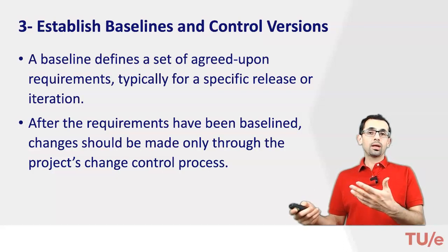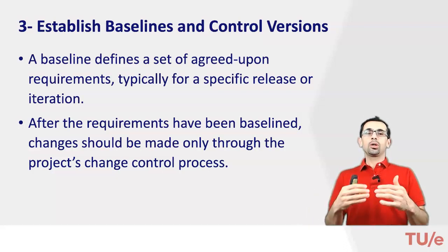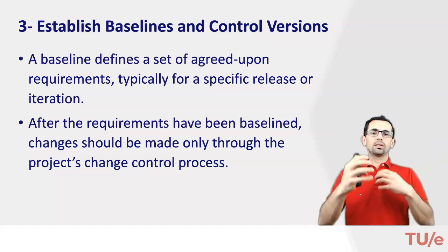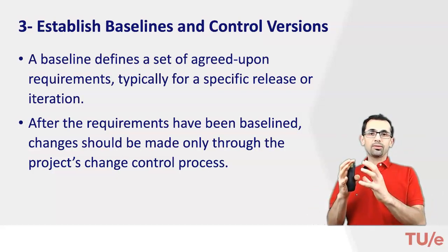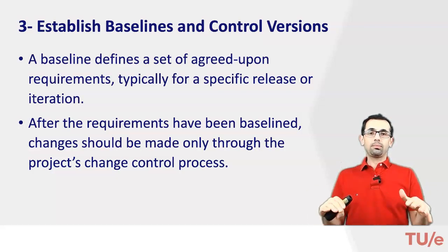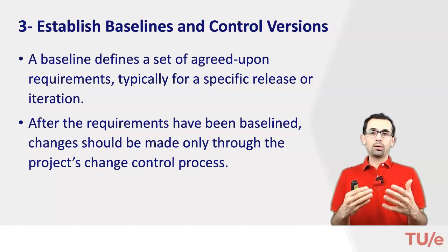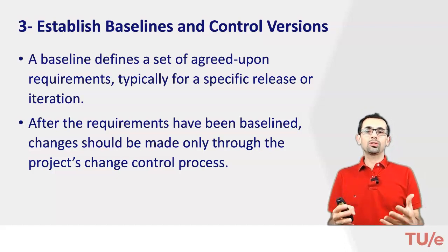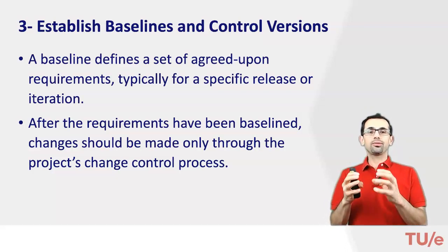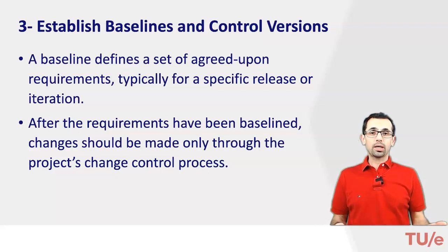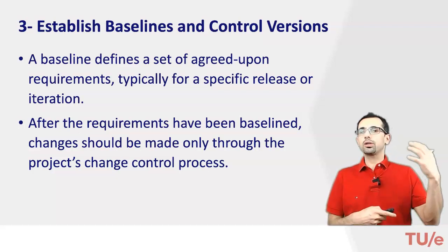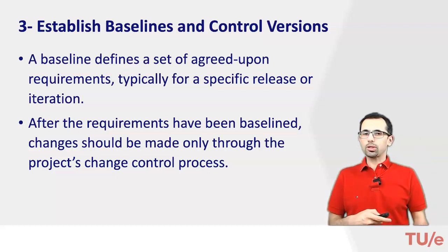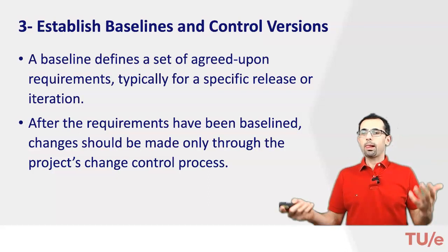As I mentioned in the previous video, you do all this elicitation, analysis and specification. At some point you say, okay, for this set of requirements I baseline them. From then on I need to control the changes to this baselined set of requirements. That's a good practice. Otherwise, again, it will lead to a chaotic situation, and the project will take longer, cost much more, and so on and so forth.